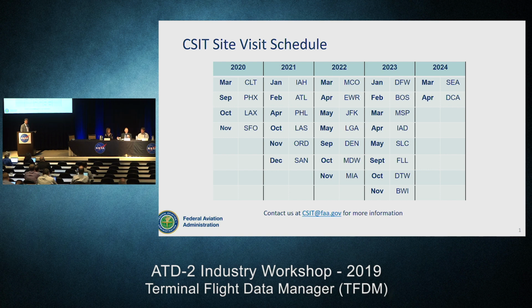We've already laid out every activity at every site. We've got it all scheduled. It's all in our corporate work plan. It's already in the contract with Leidos. We're already buying the equipment for the first 12 sites. And so if I swap a site out, there's a financial impact, and it has to be a significant, justifiable reason why it occurs.